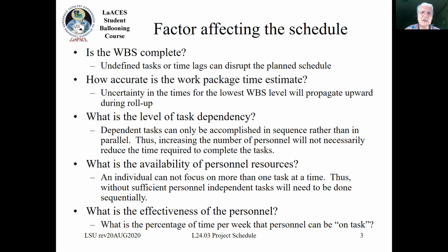Is your WBS complete? If you have not identified all your tasks or timelines, then quite likely your planned schedule is going to be bad. You aren't going to be able to have confidence in that schedule. Are your work package time estimates accurate? Any uncertainty, like padding that you put into those work packages for the time estimates, is all going to propagate upward as you do that roll up.